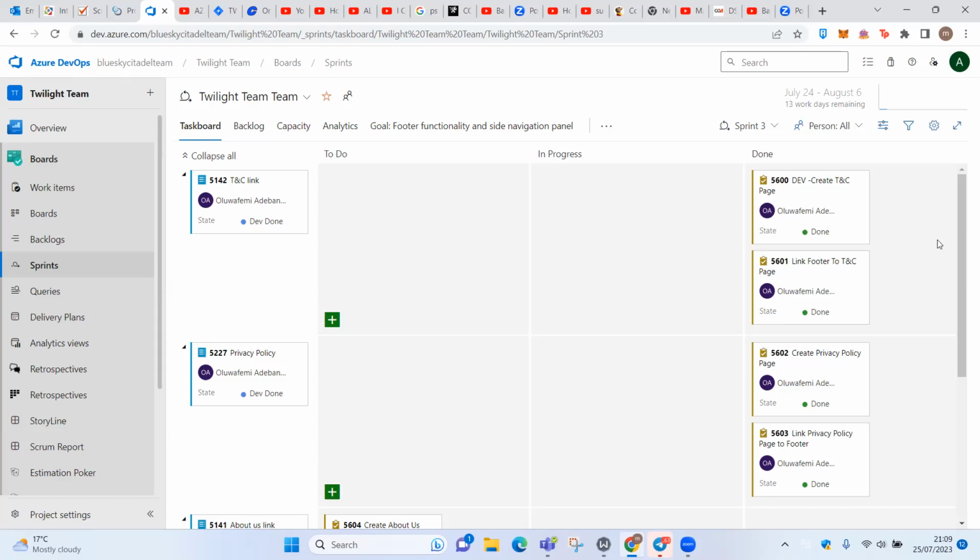I remember somebody saying that yesterday from the last sprint. Even when we were doing our estimations for the last sprint, people were picking some high numbers, because they were just picking the numbers thinking it was for us developers, but that one is regarding effort. So now, when we were doing the sprint plan yesterday, everyone was picking around the same sort of number, because they are getting the experience. They've gone through the environment and now know how it is. So that's how they get better with estimation.